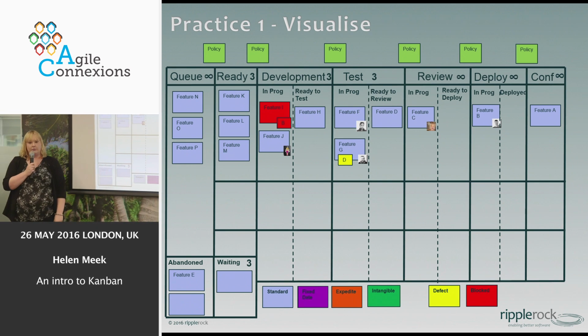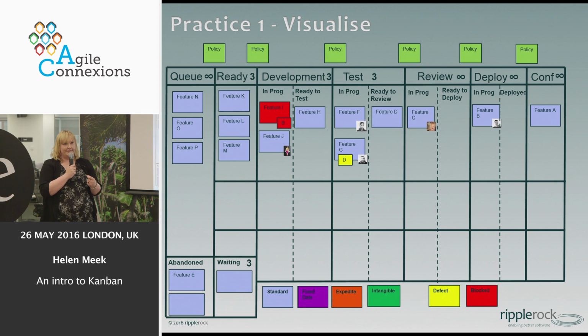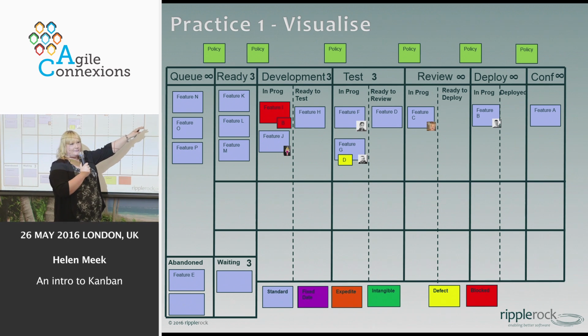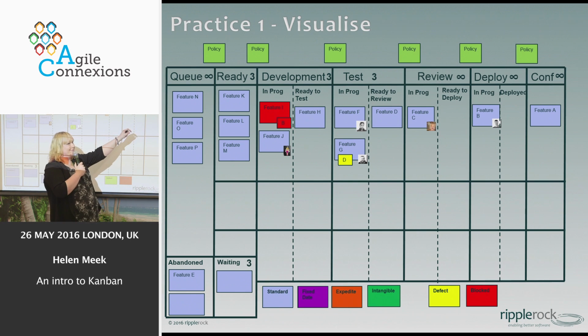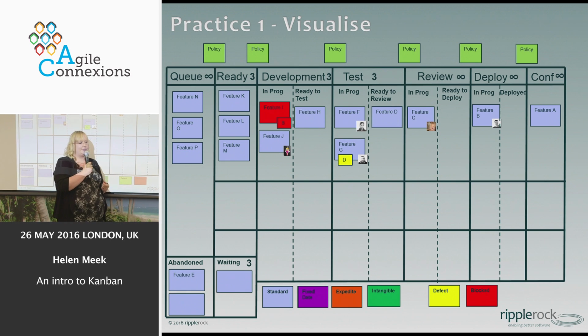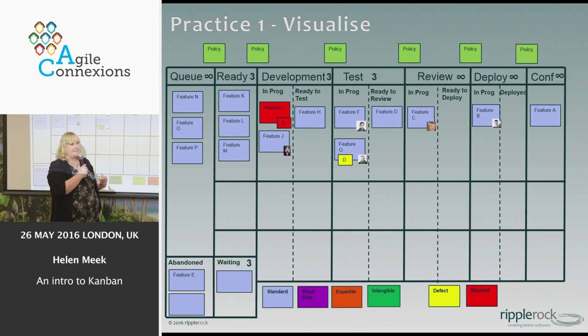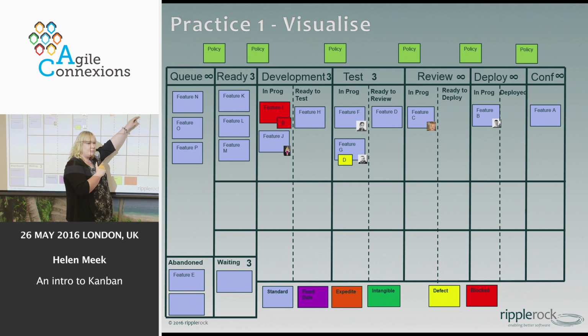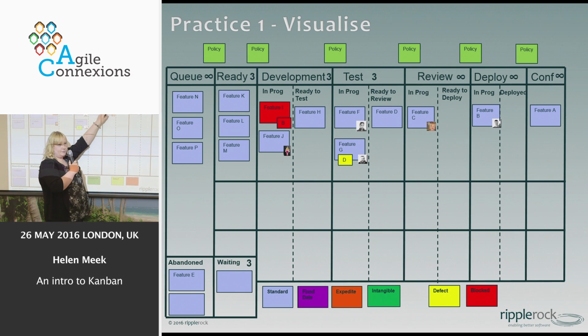And that's why in Kanban, when we do the daily Kanban, another way of saying daily Scrum, we start from this side of the board. And the daily stand-up, or the daily Kanban, I'm getting confused myself now, you tend to have that more facilitated. You don't do the 3 questions like you do in Scrum. The facilitator of the daily Kanban will say, what do we need to do to get this feature finished? Does anybody need any help? Is there any problems? Can anyone pair here? No? Okay, fine. So what's happening on this? What do we need to do? Can we help? Is a defect? Is that blocker fixed? So it's much more of a facilitated conversation driving from the value side of the board.